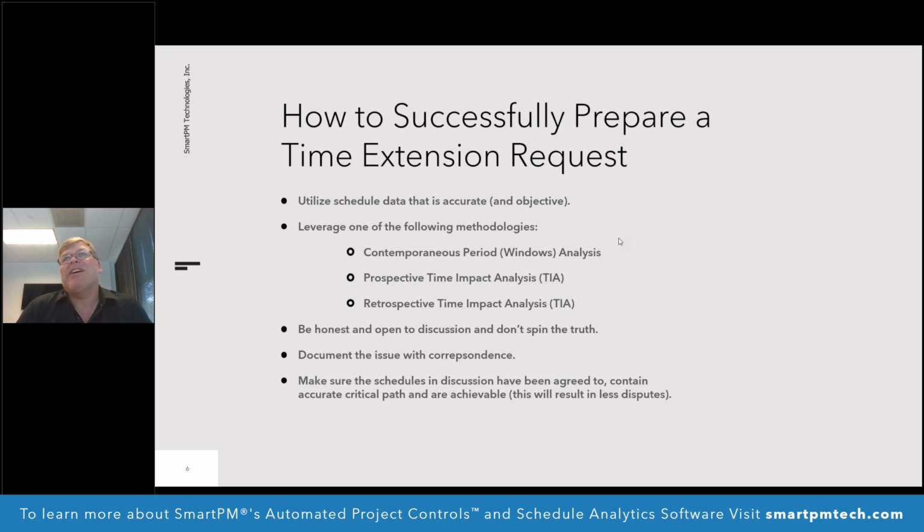And most supers and PMs that are updating the schedule are not doing it, especially at the end of a month. They're not sitting there going to their notes, and they're not taking the best notes to do it. And they're really relying on memory or, in some cases, photos. But if you're just doing it every week, it doesn't take more time.